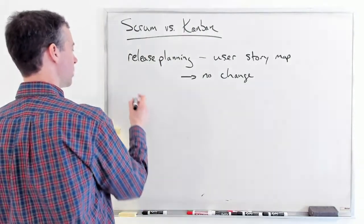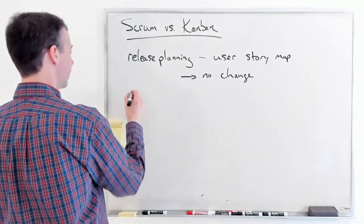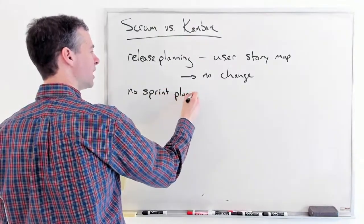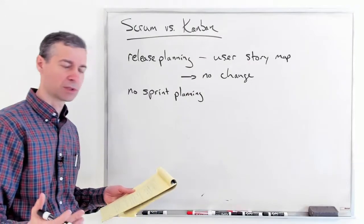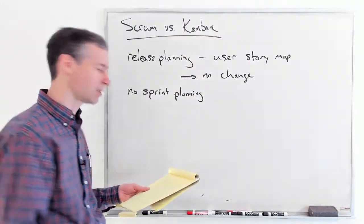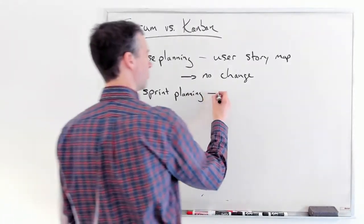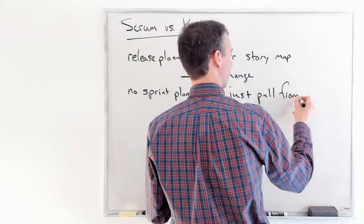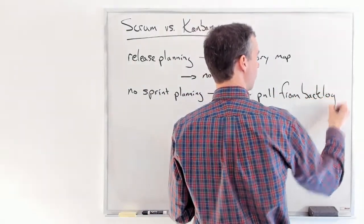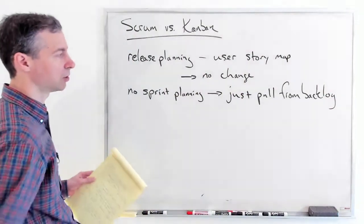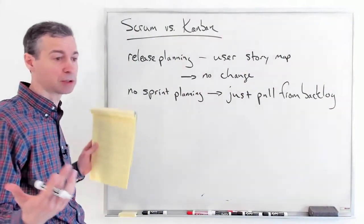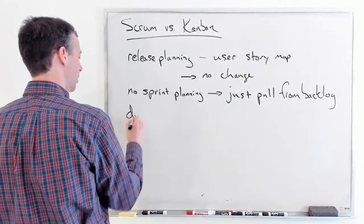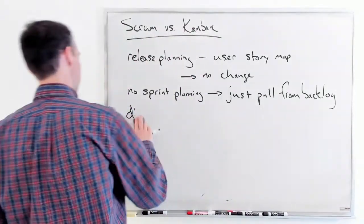What about sprint planning? Well, there are no sprints, so there's no more sprint planning. We don't need to do that work, which is actually a relief — it saves us some time. All we do now is pull from the backlog. When it's appropriate and we can do it within the work-in-progress limits, we pull. We don't need to plan the sprint because there's no sprint to plan anymore.